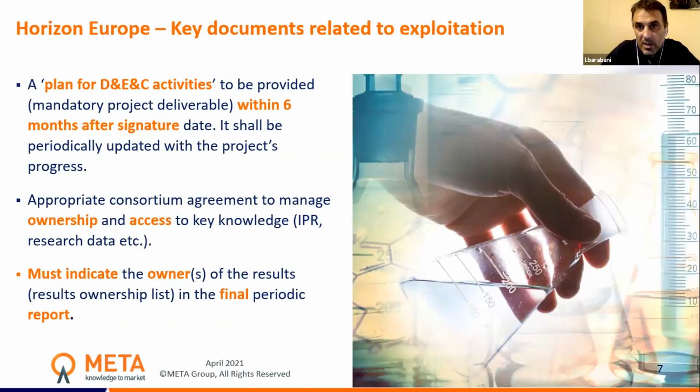What's compulsory now when you prepare your proposal? The plan, as we said, and this is the draft plan at project proposal level. Then within 6 months of the signature of the grant agreement, you have to provide a more detailed plan. So it is a mandatory deliverable.